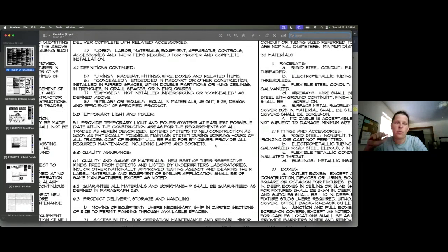Milwaukee Public Schools required Square D specific, but then there are also those performance notes. I can give you another Milwaukee example. They did not want box extensions, so you couldn't use a box extension on a 4-square to get more space for your wire fill. That's not something that drives an estimate, but it has to get driven down to the journeyman or foreman level, so they're not thinking they can just throw an extension on a box and keep going.